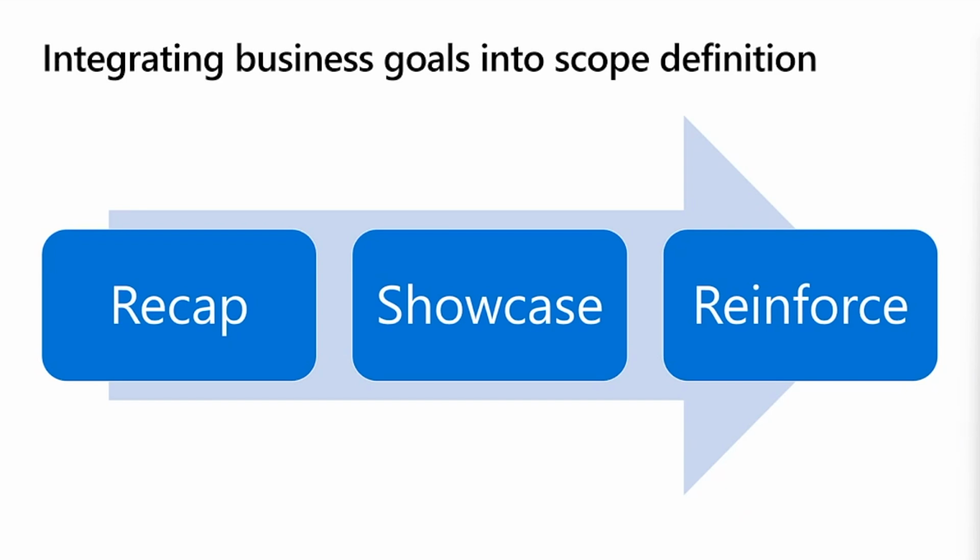They might be summarized for ease of selection and use in the catalog, and then you need to showcase how these goals are directly integrated into the scope definition process. The most simplistic way to do this is by creating a pick list, adding the column, and mapping it. We recommend that you do that mapping at least at the L2 level.